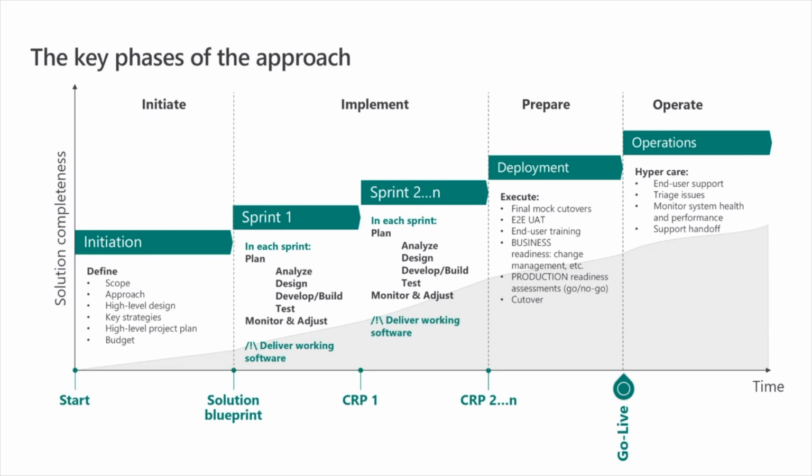And by initiate, that includes all of the activities, including all the pre-sales activities leading up to the definition of the project, maybe the definition of the project charter, where you've defined your project goals, you've defined the project scope, you've got a reasonably good idea of what approach you're going to use, you have a higher level view of the design that's going to be part of the delivery, you've got your key strategies defined, and you'll probably have a budget and a high level, at least a milestone level project plan. And all of that culminates in a solution blueprint.